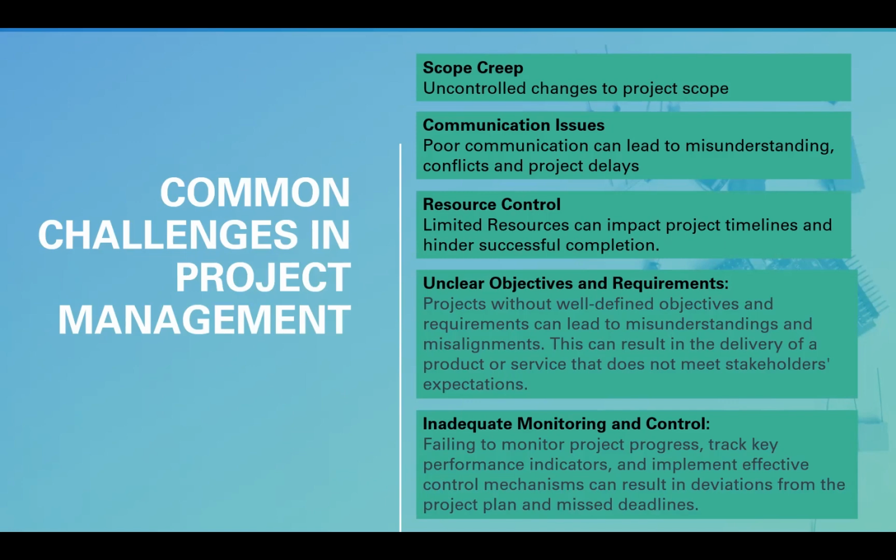As a project manager, project controller, or project support officer, you will say, this is the advantage if we can add it to this service. You will also add in your proposal the additional cost for adding this, as well as the time implication. If your sponsor says, okay, add it to the project, so the budget has changed and the timeline has changed, now it's no longer scope creep, it's an additional function in the project.